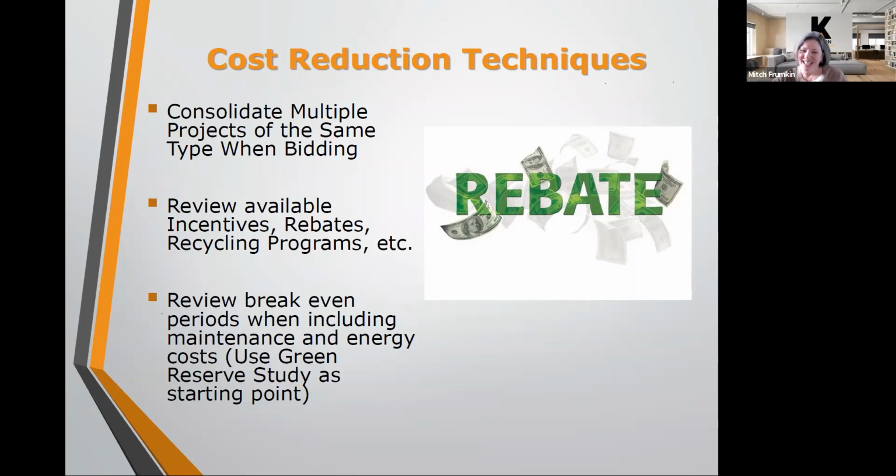Thank you, Jody. Okay, I have another question here. When an association has a contract with a hard to replace contractor, and the contractor is charging for more than the contract includes, what do you recommend? So again, with contract administration, having an engineer involved during the contract process is also good, because we have it in our contract documents that anything above and beyond that base contract needs to be approved by the engineer.